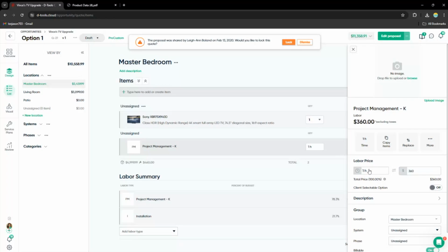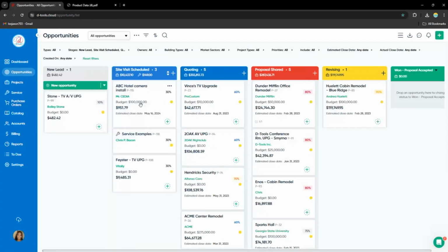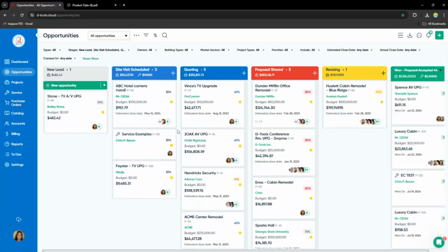Yeah, and then you can always just mark this up, and again, they don't need to see the actual time, but I would use a labor type instead of an allowance. Okay, so an actual line item in the quote versus the allowance in the quote. Right, or a labor type. They're both in the quote, but a labor type instead of an allowance. Try that out and then let me know how you feel about it. Okay, will do. Thanks. No problem.